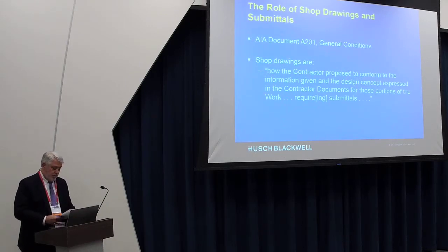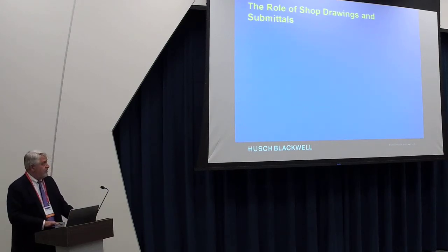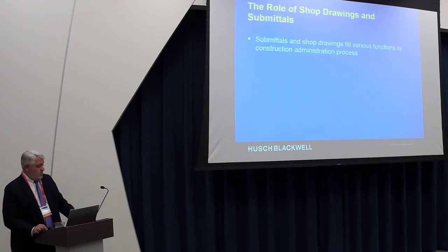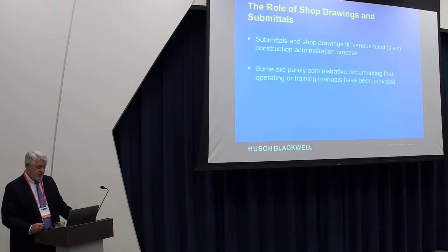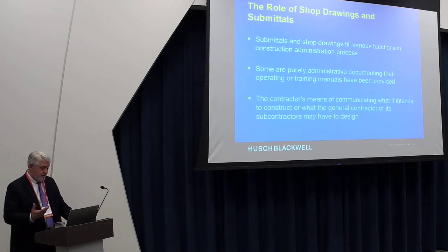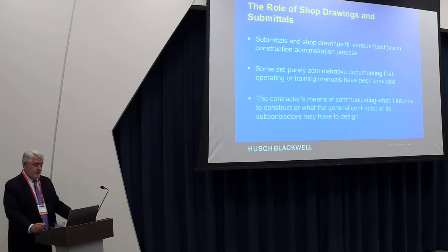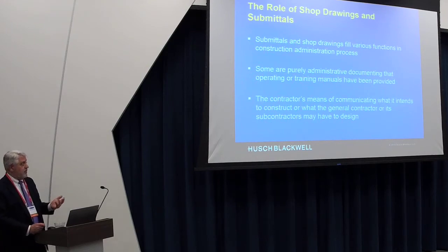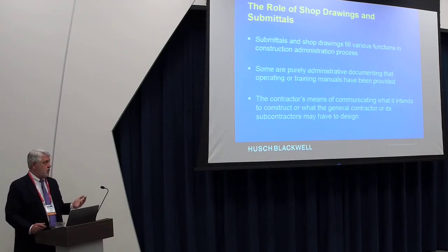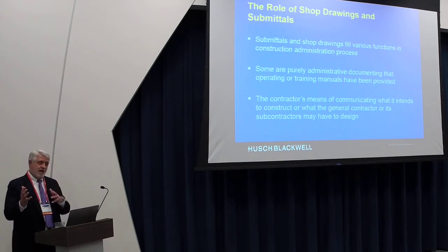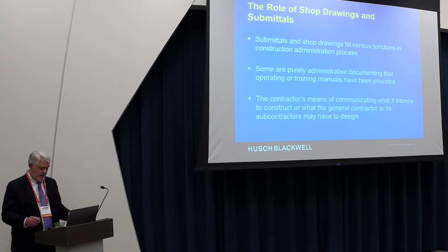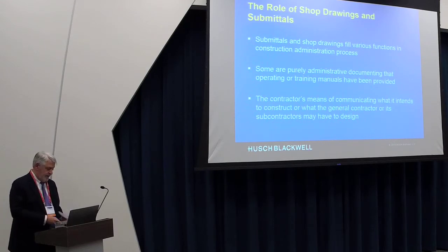And it is important to remember what the function of submittals are. The function can sometimes be something as simple as just an administrative process, submitting the operating manual or a training manual for equipment that's on the site. Or it can be something more important, like the contractor's means of communicating what he intends to construct on the project, or what he may have been delegated to design under the contract, and how he intends to meet that design concept.